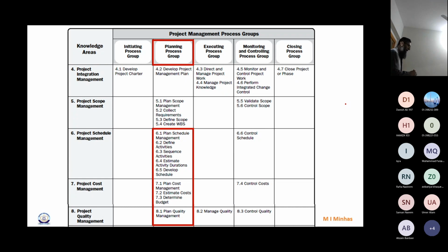So he will have some kind of checklist, a predefined process. This is how things would be mixed. This is how things would be poured. And for this much time, it would be left for curing. Correct? So all this process from beginning to end is defined in the quality management plan. Plus, it is also defined how many people will observe and assure that this process is followed. The quality assurance team would be standing over them, to ensure that whatever process was defined here is followed as well.